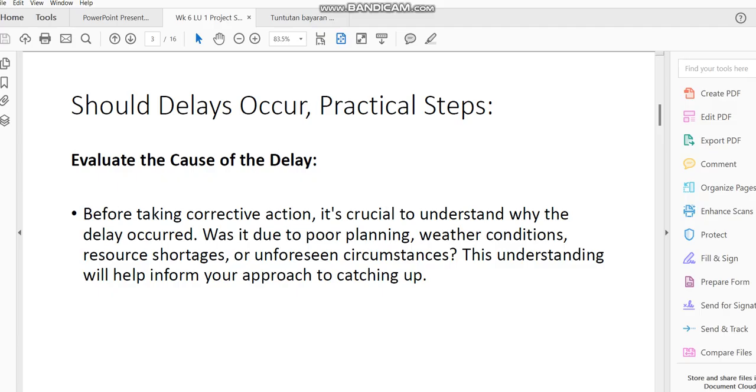Normally, if we're supposed to complete 50% this month, and yet you're only completing 30% after your calculation, then it is an indication that things may not be that well. So the important thing here is we must learn how to detect the overshooting.